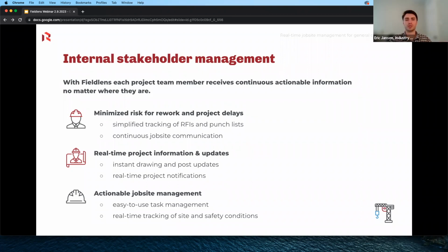So something that Nicole is going to show you is the ability to upload, compare, and mark up drawings, whether they're just temporary markups or what we have as red line markups. Those are ones that are going to stay there, be permanent, only allowed by specific users, but maybe something was caught in the field. There isn't a new drawing set pushed out yet, but you can do those red line markups so that everyone's working off the latest and greatest. And making sure that every sub has access to that.